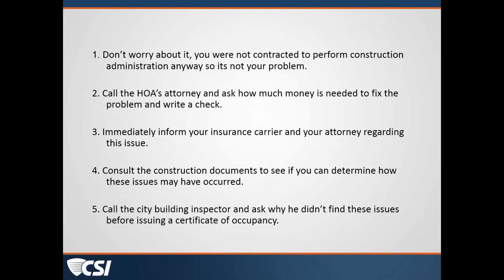Oh, Rietta just pointed that she would recommend number 3. Yes. Number 3 is always a good answer. You know, we talk about this frequently, but many of our liability insurance policies don't just recommend that, but they require it. And if, in fact, your first phone call isn't to your insurance carrier, you can often negate the value or even the coverage altogether of policies if the carrier isn't at the table from the very first conversation. So that's a great point and an important first call.